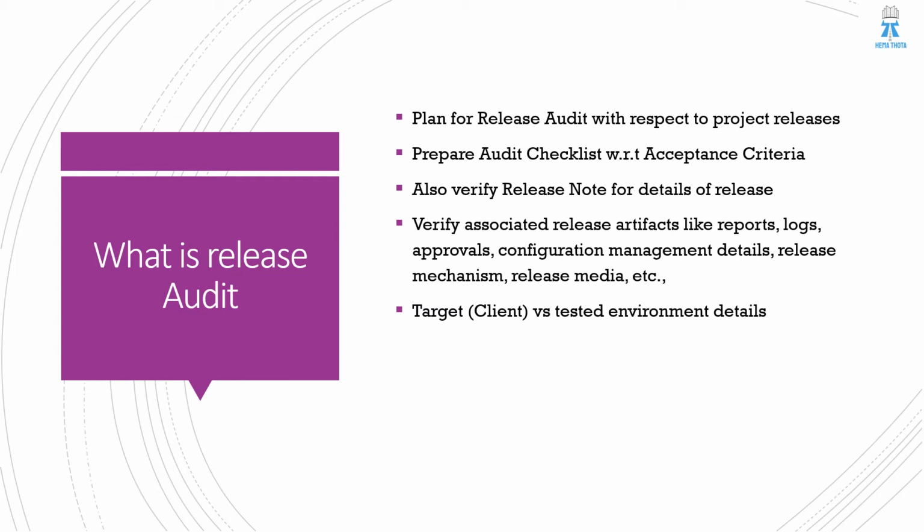That's when you need to check the contents of the release note: the release date, release version, project name, the list of artifacts they are releasing, the version of the code, the bug numbers they fixed in that particular release, and the known bugs. You can list the bug numbers that are still open, and the change requests they have implemented in that particular release.